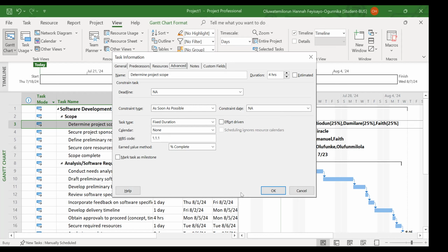Prior to this time, we were supposed to be 100% of the 4 people. Now that we've reduced our time to just 25% to do the job, what will happen to the time needed to sweep the stadium? The time will definitely increase.